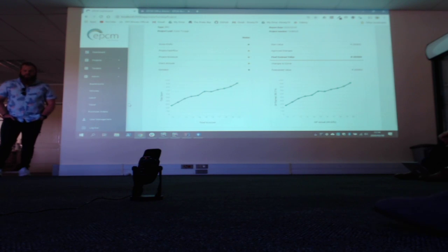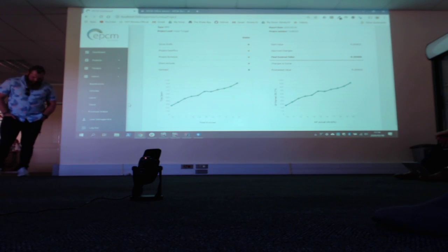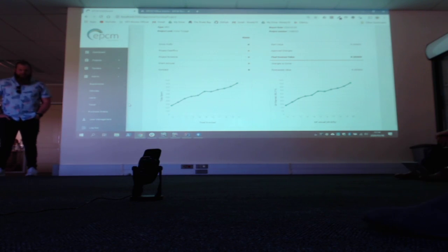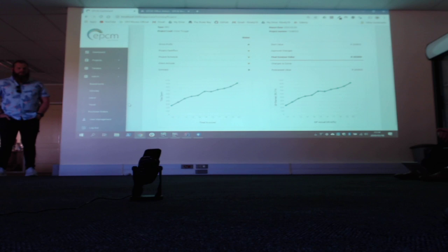So what we're planning to do is, we've actually built this already in Excel, but it needs to be incorporated into the system. So it's a basic risk assessment which will flag problems for you. If you complete the 10 questions that it'll ask you, it'll tell you, okay, your problem is you need to build a cash flow, you need to build a basis of design to capture the engineering, and you need to build, for instance, a detailed cost estimate. So it's just a way for us to capture, from an ISO perspective, what our company needs to do in order to make sure that that project will be a success.